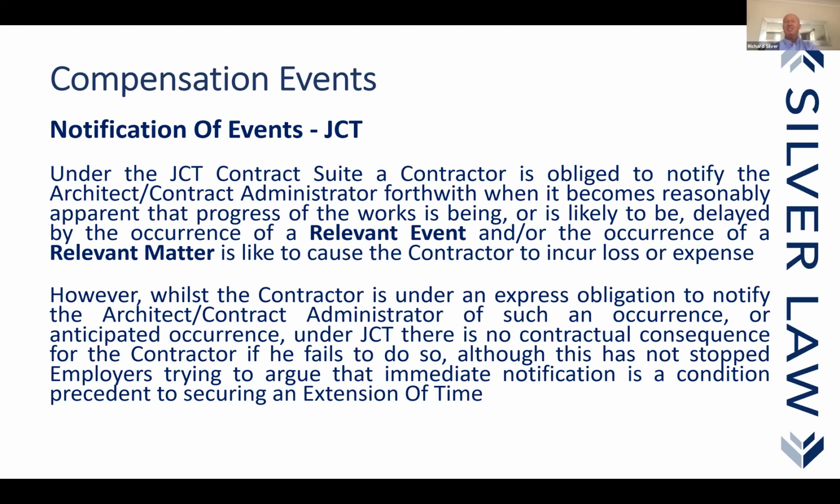Now, let me just emphasize this because all too often it doesn't happen. For each and every instruction issued by the PM, which constitutes a change to the works information, the project manager is obliged to issue an early warning notice and a compensation event notice and a request for a quotation from the contractor. I'm going to go through this again because it does not happen.